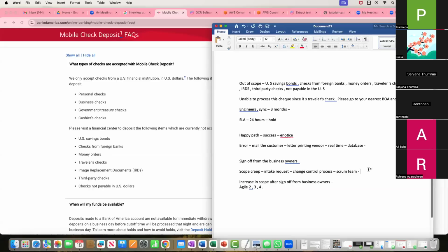So we have to deal with this very well, be a very good professional, and use very nice, very professional words. First of all, you have to be very calm and composed, and saying no is an art. Say no in such a way that they don't get offended. You have to say that I understand all these are missed requirements, I totally understand, but I'm not the one who can take the decision for this, right? So there is a whole team behind this, and we have a process. This process is called the change control process, and you have to submit a new intake request, and then I have to discuss with my engineers, scrum master, product owner, and my manager, and we will come up with a new timeline and new funding also, because if there's additional scope, there is additional funding. So we'll come up with that, and if you are able to approve all of that within this particular date, then we will let you know when we can go live.